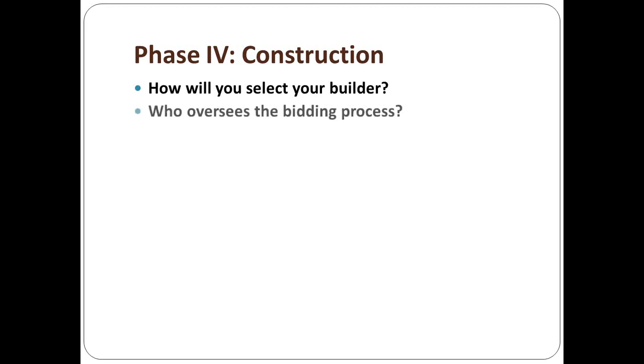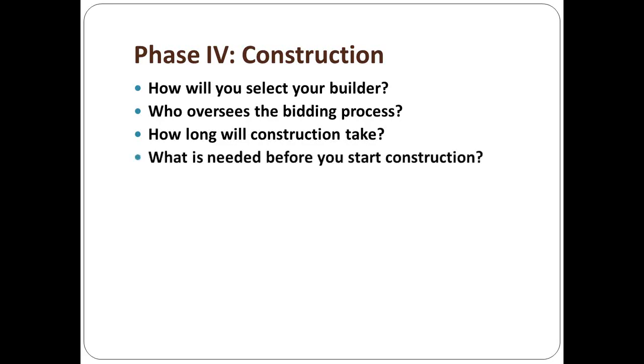Who oversees the bidding process? The architect does. But you're going to help in that, but he's paid. If you pay him, he will oversee the bidding process if you do the traditional way. If you use construction management pure agency, you've got the bidding process where the project manager in the construction management firm is involved in administrating that. And some architects really appreciate the construction manager taking that off of them.